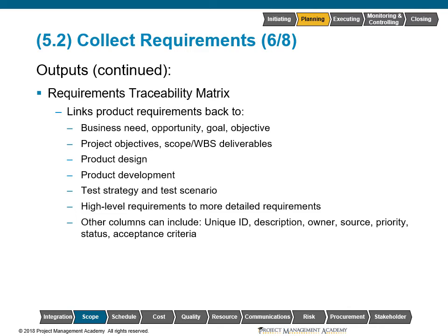The high level requirements to more detailed requirements. So in the very beginning of the project, especially while we're drafting the charter, we're going to be dealing with very high level requirements. So perhaps we need an 80-story office building with at least 200,000 square feet of office space. But then as time goes by, now we're looking at number of elevators, fire extinguishers, electrical outlets, land drops, and so on. So we're going to get the more detailed requirements as we move forward.